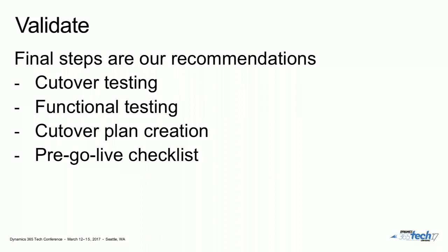But still, the cutover testing is normal. The full functional testing would complete. Both of those things would go into the cutover plan creation. And this pre-go live checklist is, we're just recommending in the final few days before the go live to run another data upgrade run and to have a cutoff for setup changes in the 2012 environment. No more config change type stuff, so that you're reducing the chance of anything changing when you actually go live.